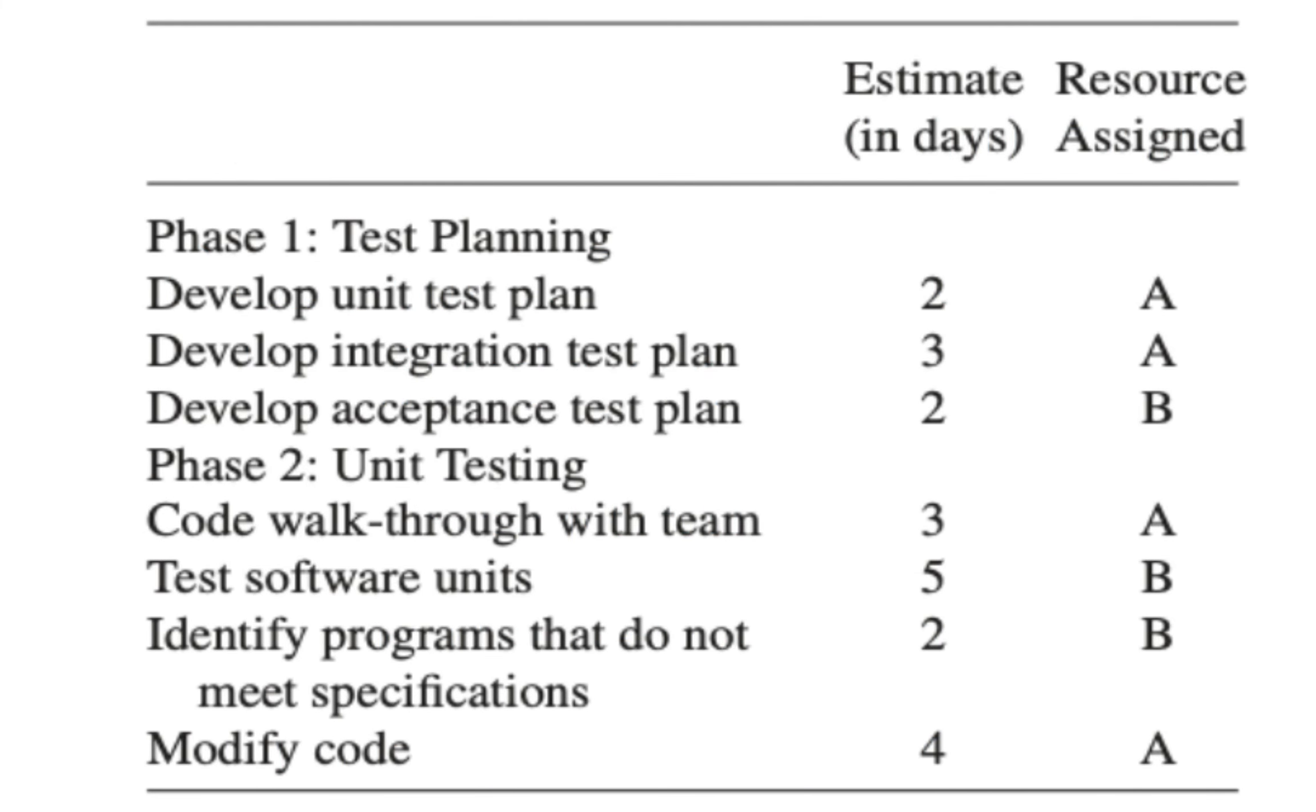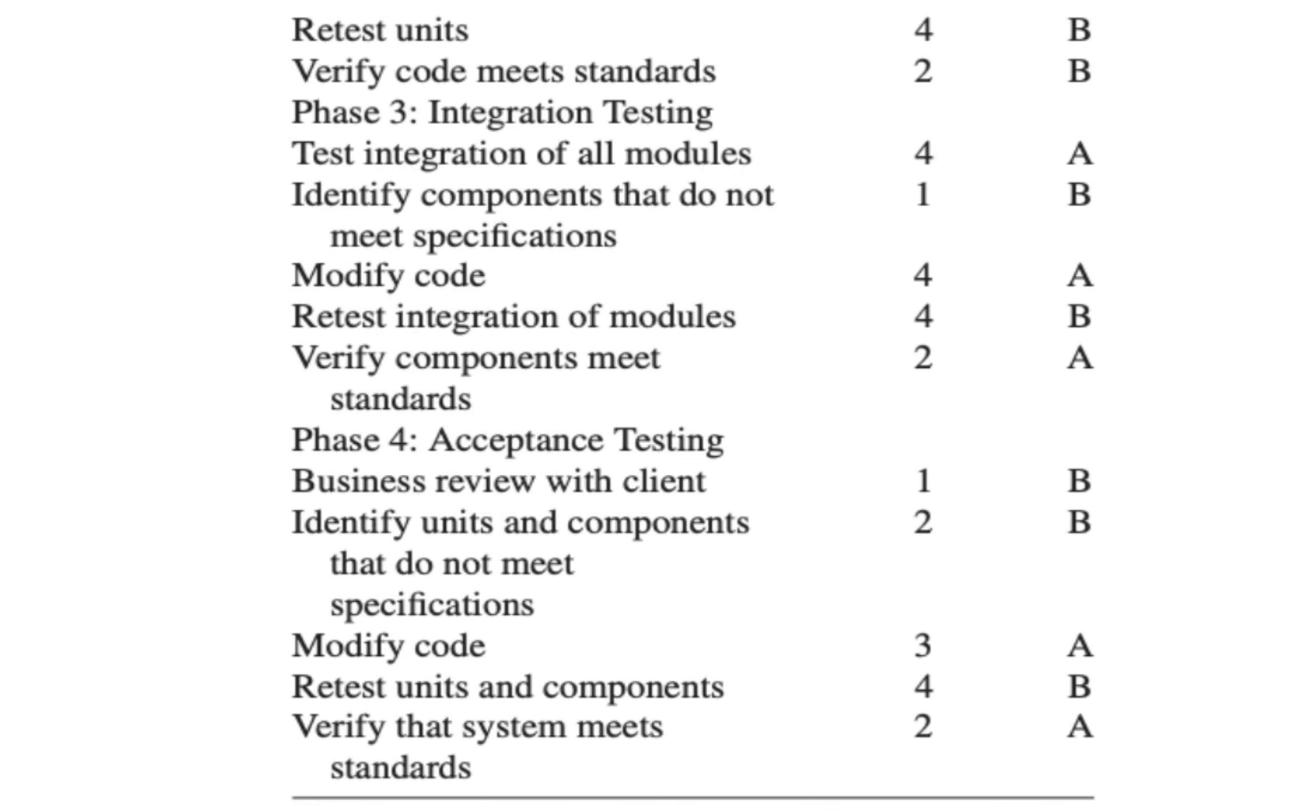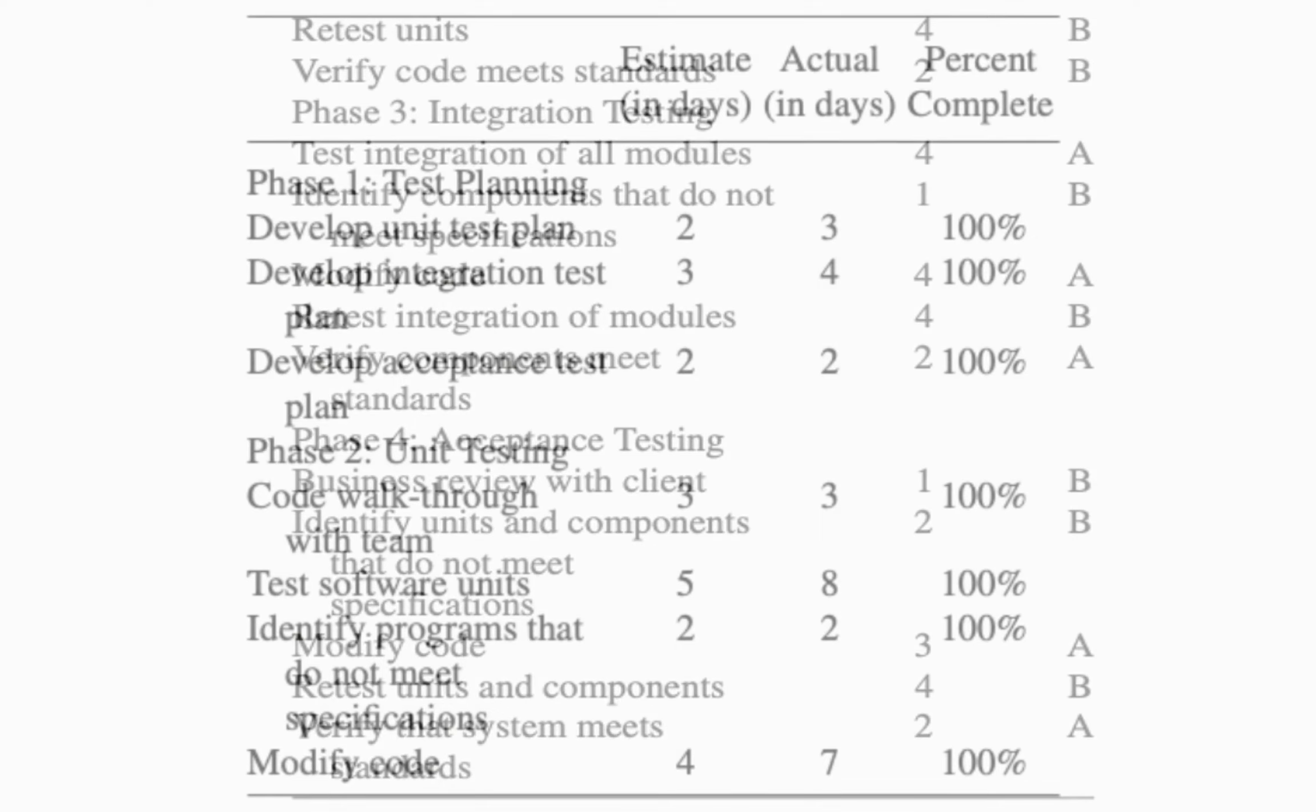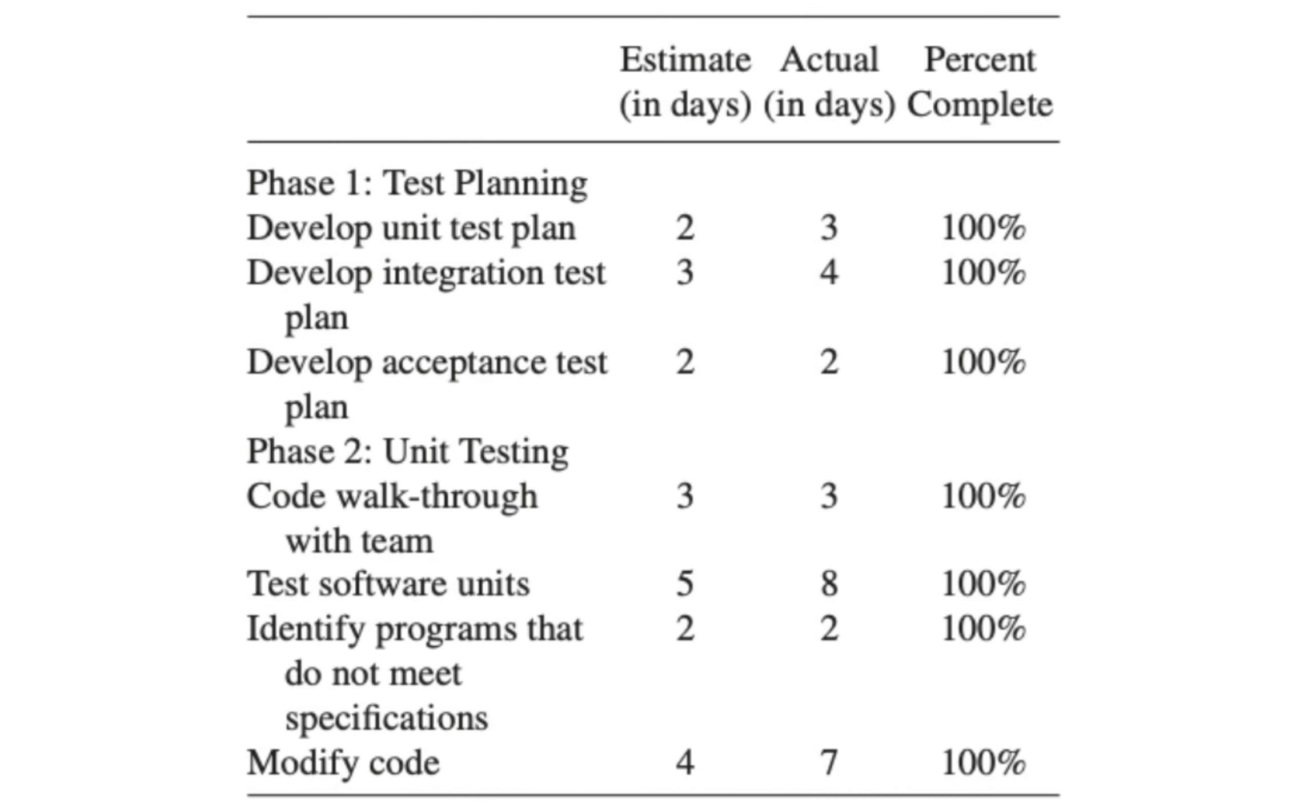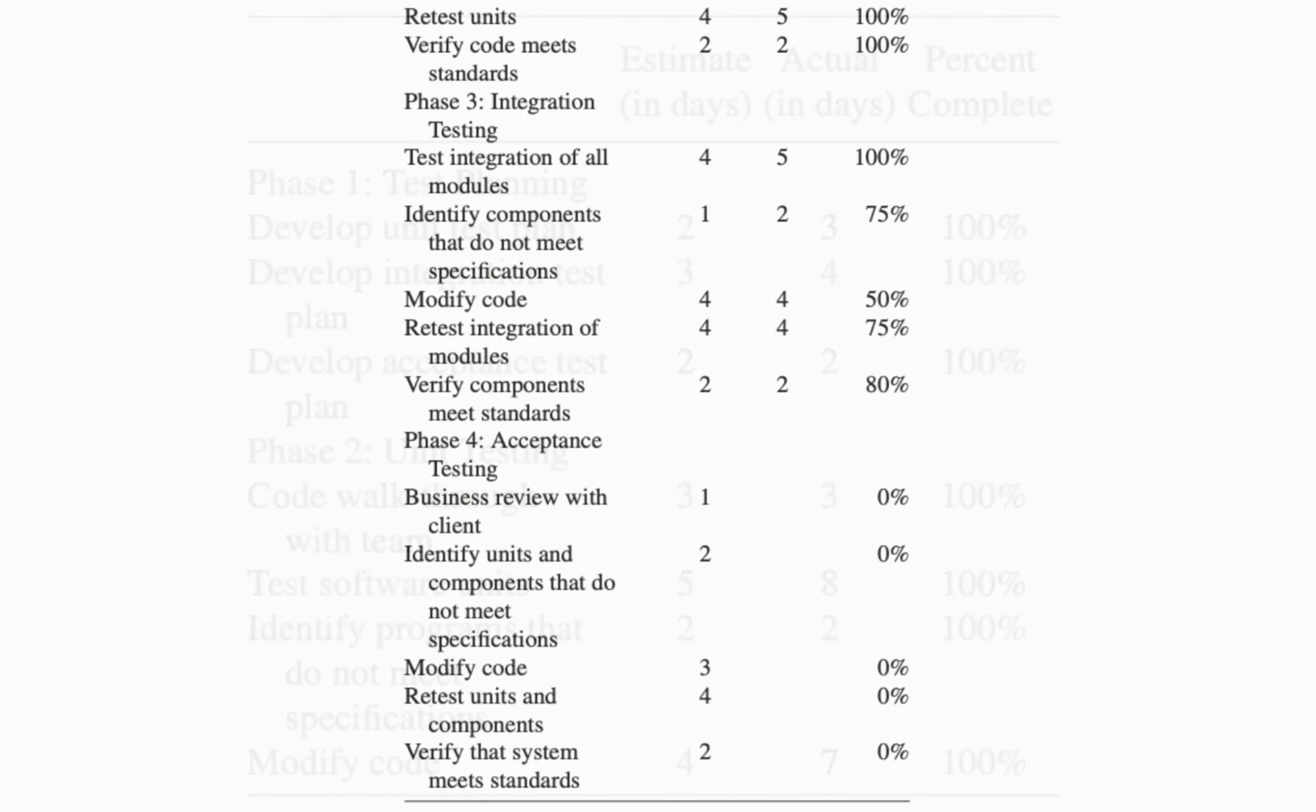As you can see from our textbook, in step number one, we are given the names of the tasks, the duration, and which resources are assigned to them. Then step number two is asking us to set a baseline, which I'll explain in a few minutes. And then it gives us the updates on the tasks, which shows the actual duration. You can compare them to the estimated duration. Plus, it gives us the percentage of each completed task.